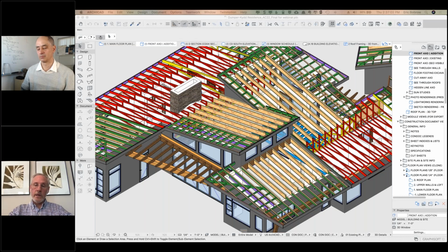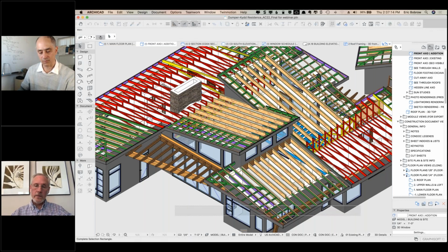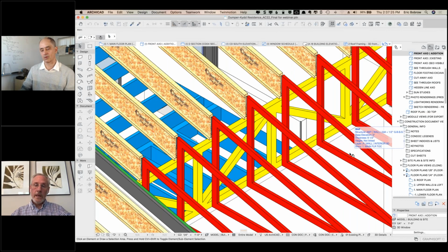If you look straight on the right hand side there, in behind those red trusses, there's a yellow truss, a flat top girder. It's a double member girder. Some of this information I wouldn't have had until I had my basic design out and finished. I basically send the layouts to the truss manufacturer, who I work very closely with.